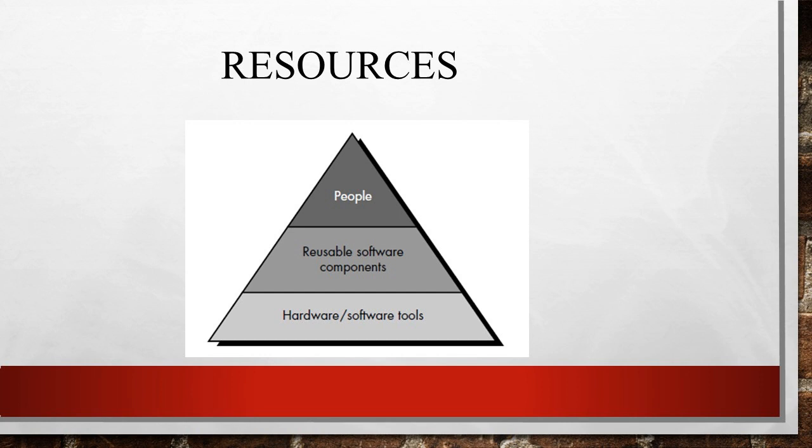When we make a plan, each of these resources should be specified by four characteristics. One, there should be a description of the resource. Then there should be a statement of the availability of the resource. Then the time at which the resource will be required, and the duration for which the resource will be required, need to be specified in the project planning.